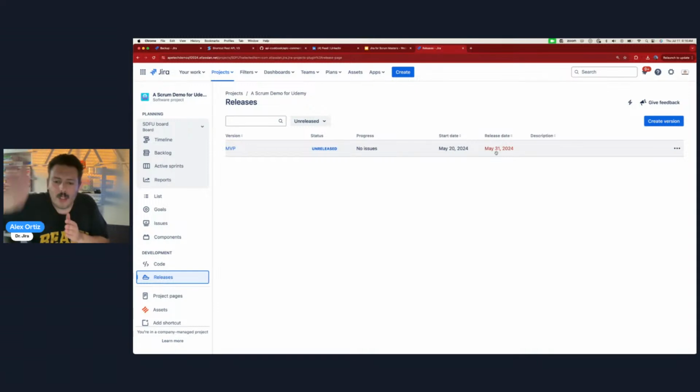The release, working very similar to how the roadmap works, is at a minimum going to give us these imaginary vertical lines on our roadmap that tell us this is the due date. This is what we're promising our customer. This is what we're communicating with our marketing, with everybody else. And so these lines become a little bit more like deadlines. And so when it comes time, in another minute or so, when we jump into the backlog and we're trying to figure out what needs to make it into the sprint, these releases should play a very, very critical role.